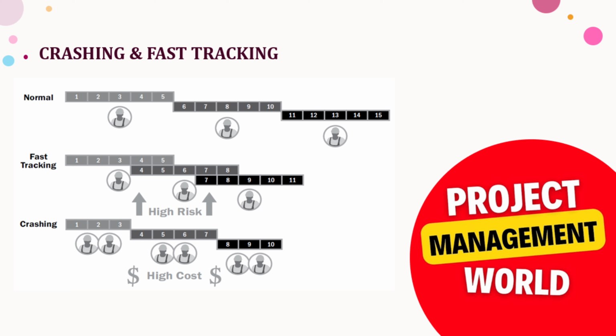And in crashing, what we did here is we did not do the work in parallel. We just added resources. So if you see, instead of one, we have 2 resources in each activity. So that's why the duration has come down to 10 days.